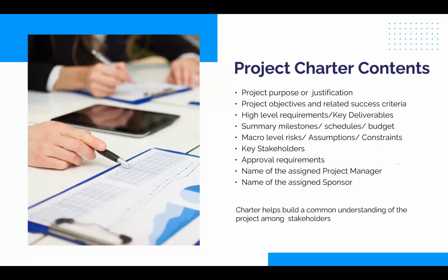And I'll also tell you this, charter can be seen as a contract between the project manager and sponsor. When I use the word contract, not in legal sense. Understand it this way. Let's say I'm the sponsor, I give you the charter today. Now, when you accept the charter, remember, you commit to deliver the project as per charter. So the project manager should negotiate, challenge the charter if it finds something is unrealistic. Let's say you find that the schedule is unrealistic, for example, you should challenge it. You don't just accept, negotiate with the sponsor.